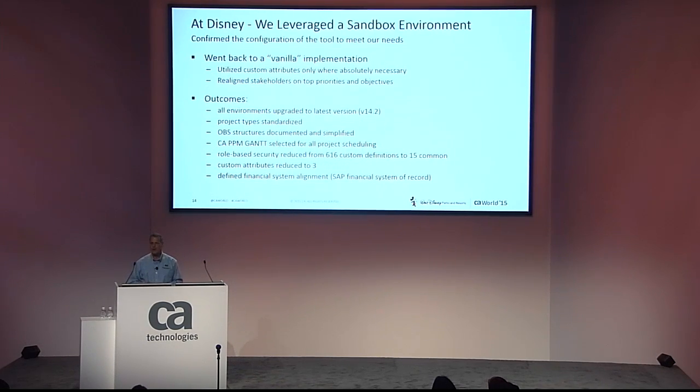So how did we start over? At Disney Parks and Resorts, we actually leveraged what we're calling our sandbox environment. We stood up a separate environment and reverted back to a pure vanilla implementation of the CA PPM tool. We utilized custom attributes only where absolutely necessary, and we realigned our stakeholders on our top priorities and what we were trying to achieve in implementing the PPM tool.